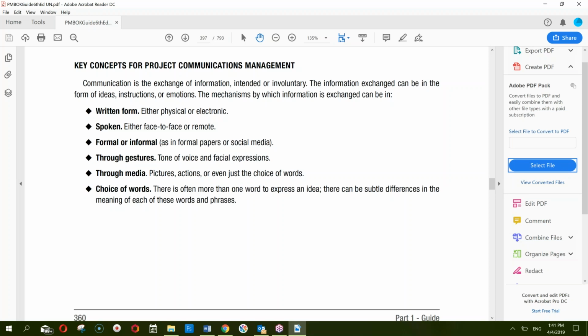Right. So for every project, I have to identify the stakeholders, and a list of stakeholders or stakeholder register will be created, which we have talked about earlier. That after the charter is developed, the first thing project manager needs to do is to create a stakeholder register, identify the stakeholders, and this is a living list.